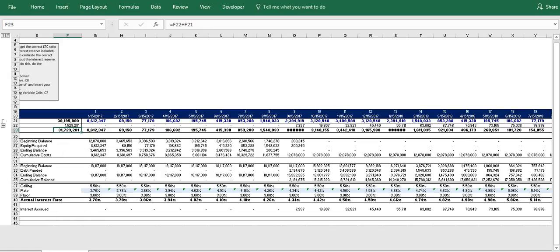Okay, so in order to do this our model needs to go through a two-step process, which is: one, creating the interest reserve in the first place, which is why we set the debt and equity draws to calculate on the construction costs pre-interest reserve; and two, we need this model to calibrate the interest reserve so that the equity and debt are truly set to the desired loan to cost ratio, which we do this by using the total construction cost schedule plus the interest reserve which is in row 23.